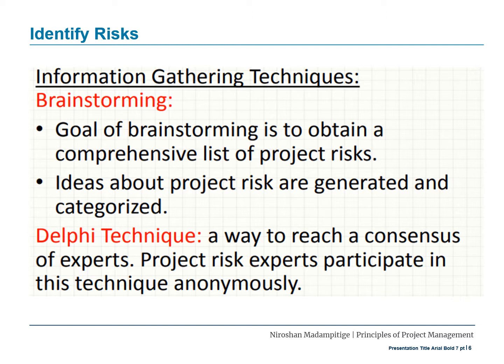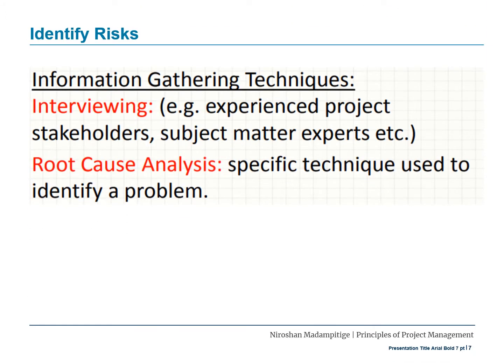Delphi technique is a technique to reach a consensus of experts. Project risk experts participate in this technique anonymously. Interviewing is, of course, a way to talk to people and get their opinion. So you probably target getting the opinions from subject matter experts and experienced staff and your stakeholders. Root cause analysis is another great way of gathering information. This is a very special technique used to identify a problem.